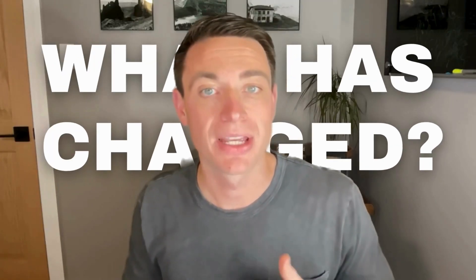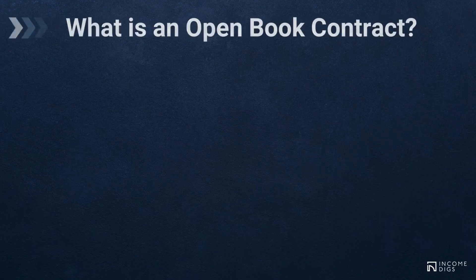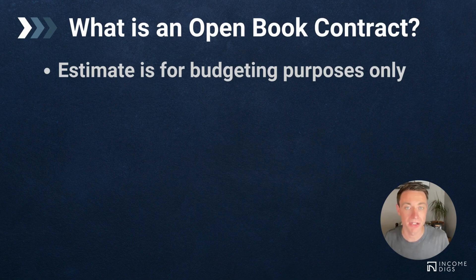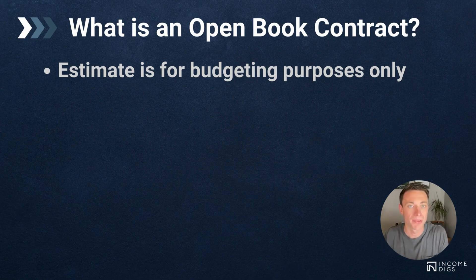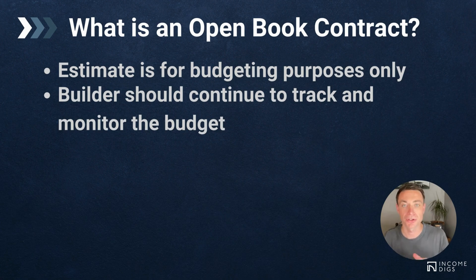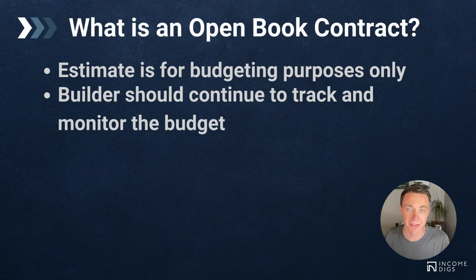What has changed is that Buildertrend now gives us the option to do an open book contract. With an open book contract, your estimate is for budgeting purposes only. You should always still be estimating — don't just go into an open book contract and say we'll see what the costs are. That's unfair to your customer, and as a builder you want to have a budget no matter what to track your estimating abilities and how you actually did.